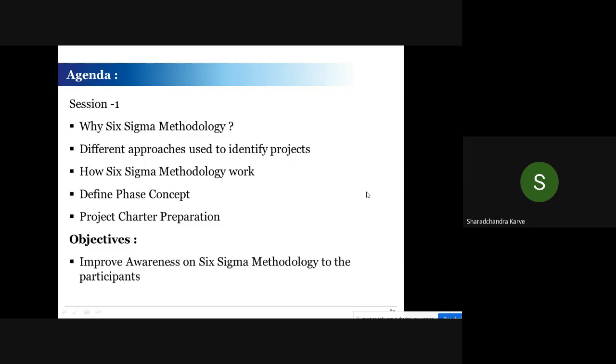Then we also talked about another important aspect, which is a secondary CTQ, or what is called a constraint CTQ. The constraint CTQ is the one I am not going to improve. That is most important, because many times in organizations we improve something, but the other thing gets spoiled. So the things which are likely to get spoiled must be written down and monitored, to at least remain steady. That is the most important part of a charter. And then we have also written down the phase-wise timelines, generally called the project completion timeline, etc. So with this background, now we move to the next.